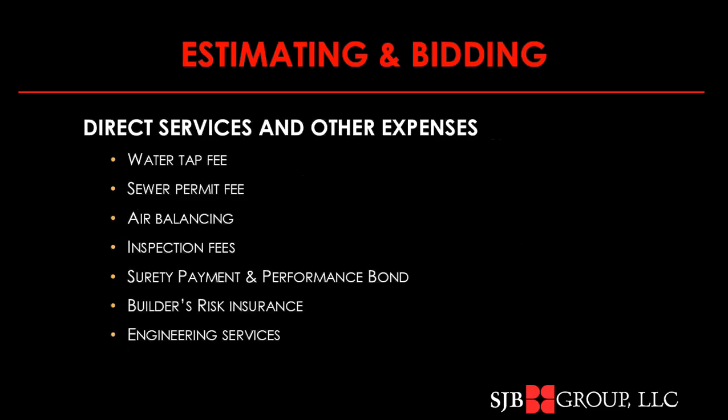Some additional direct services and other expenses to consider include water tap. What does it cost to have your sewer hooked up? In a building, you've got your air balancing period towards the end of a mechanical, electrical setup. You may have inspection fees, especially if you're using outside services. You've got a cost for your various bonds and insurances that you'll have to provide. And you may end up having to use outside services such as engineering, surveyors, et cetera, in your project.